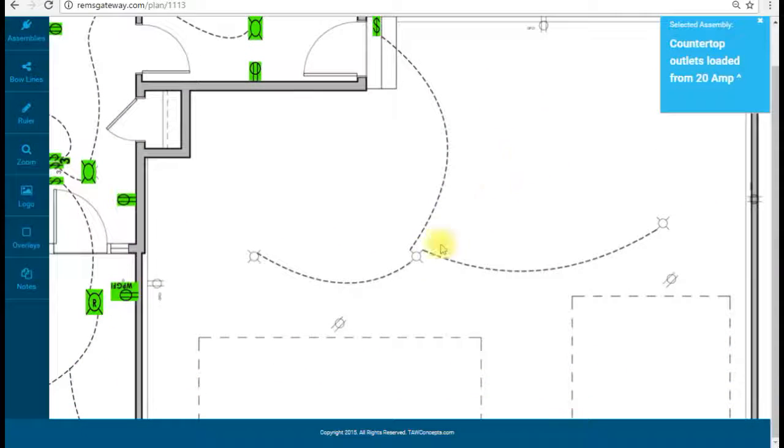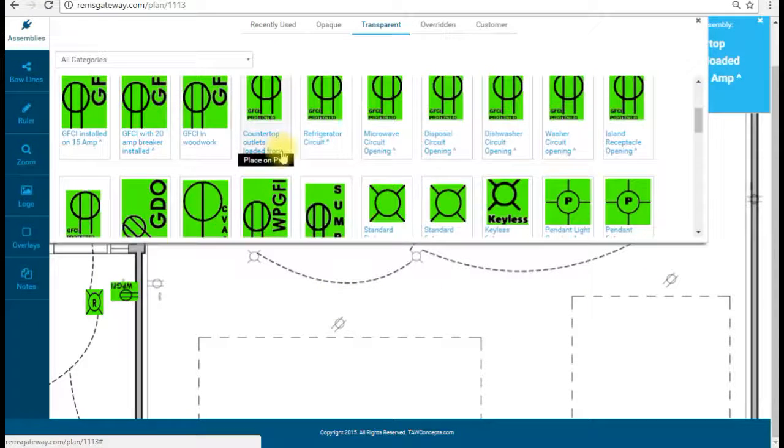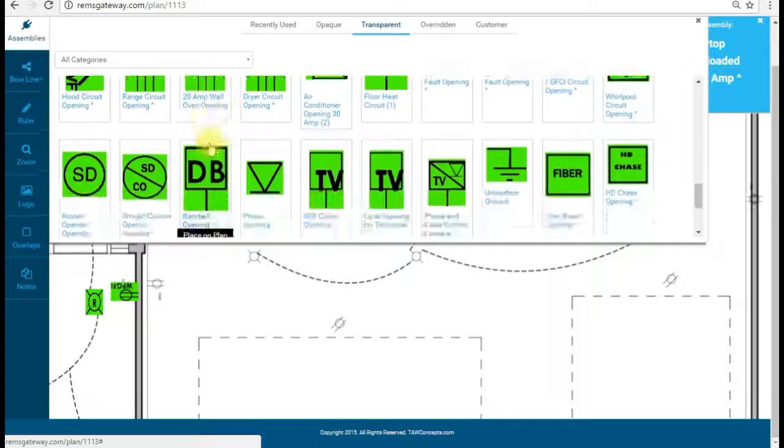Go down in this garage. Another good example, they're just showing normal fixtures, and I know this builder does keyless fixtures out in this garage, so I'm going to correct it so that my material is coming out correctly.